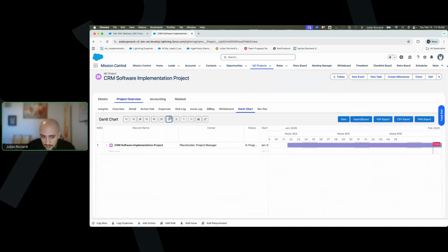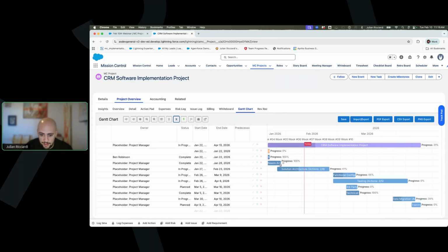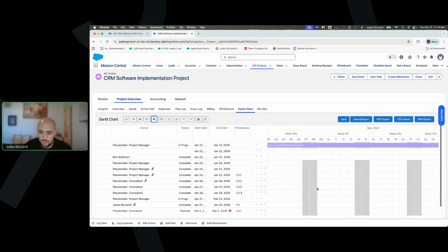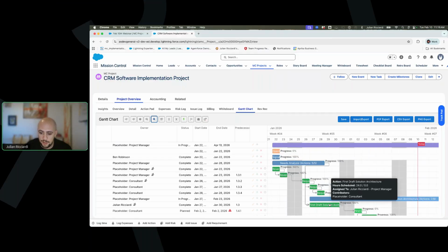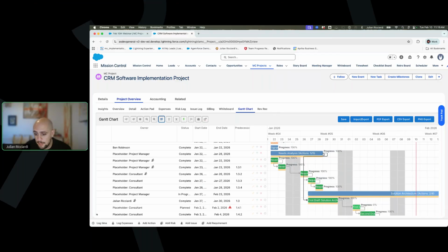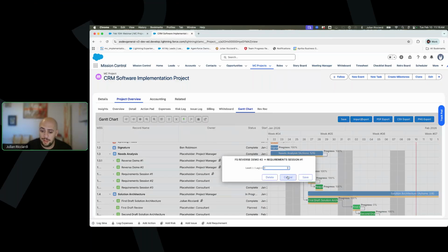So to speak to the hierarchy that I spoke to earlier, let's jump a little higher up over here. We have our project. Under our project, we could have phases, milestones, and actions as well. Now, going closer into our actual Gantt chart, you can see that I have a series of baselines and a slew of dependencies. To build these dependencies, it's literally just dragging and dropping between actions. You could build leads or lags directly within them by double clicking into it.